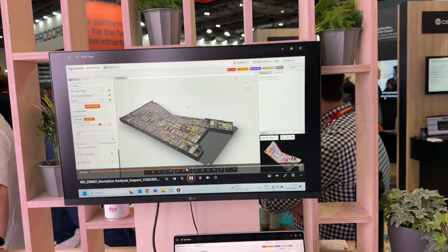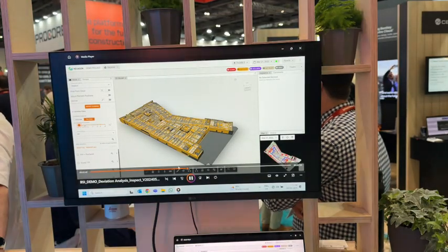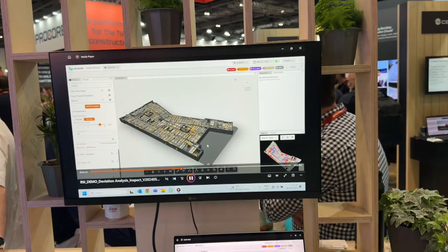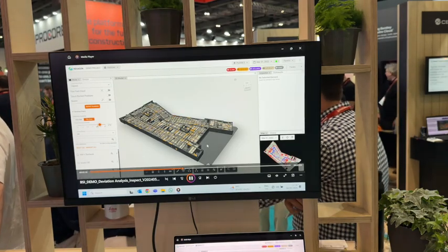They then got in touch with the factory that were building that bit of plant. They had 4 more to deliver to that site. Thankfully, they got in there just in the nick of time to get those adjusted so that when they turned up to site for the next bits, they were built the right way round. No rework, no issues there, folks. Saving massively on program time because the install of that was in the program. That can't be installed properly.